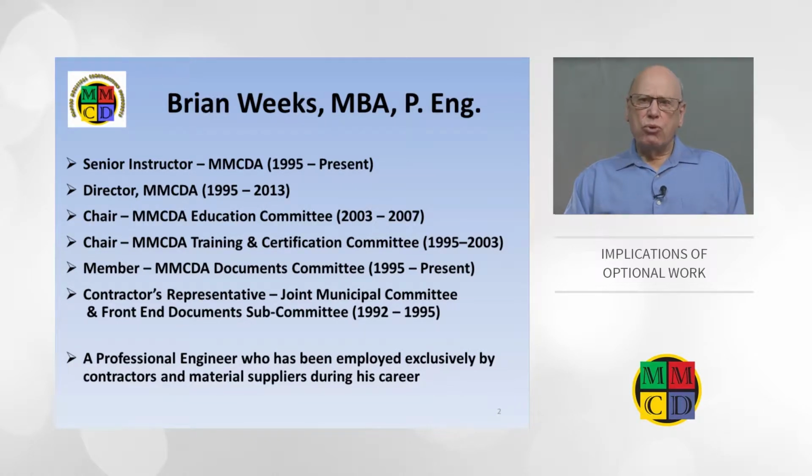Optional work has two defining features. First, each item so defined may only be constructed after receipt of an authorizing change order. Second, because optional work items may not be authorized at all, they are specifically excluded from the general protection of price adjustment review for significant quantity underruns.